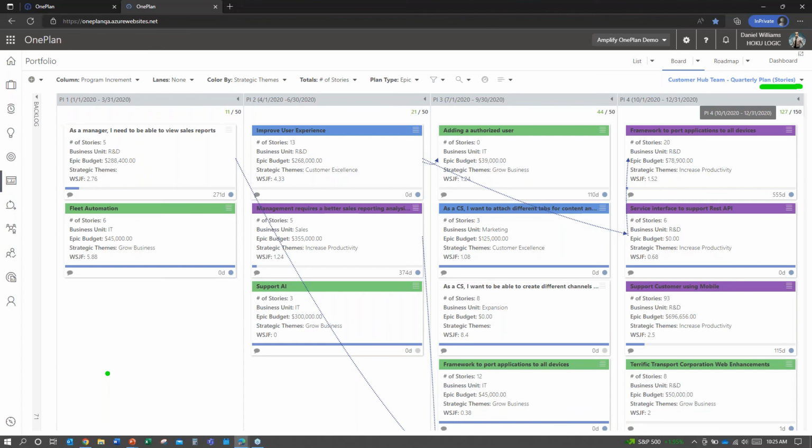In this case, I've taken it even one step more simple than that and just talked about numbers of requirements as a very simple measure of capacity. But certainly, story points would be a more agile and more disciplined way of doing this. But the principle's the same, and you do both in OnePlan. So in this case, I have established that my teams can do roughly, or my estimates, which I'll refine over time, can do roughly 50 per quarter, and I can ramp up over the year as I improve my velocity, perhaps to a lot more in Q4.